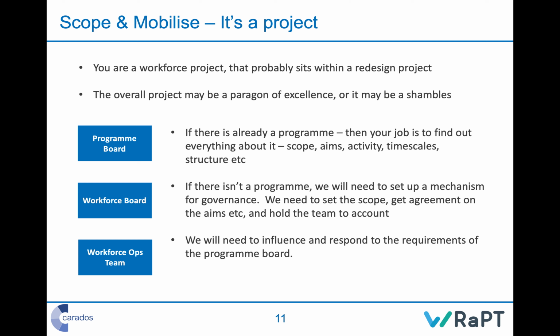If you're going to do that, what you're probably going to need is to make sure there is some sort of program board, making sure there is a workforce board that feeds into that program board, and that there is a workforce ops team, that's the doing team, that feeds into that workforce board and into the program board.